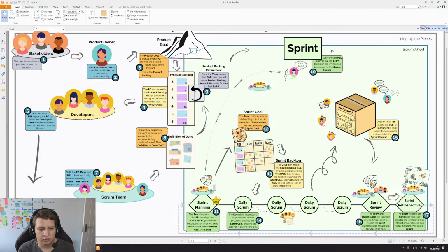The product owner wants less risk, so they would usually have a bias for shorter sprints, and the developers need enough time to get something significant done each sprint, so they tend to want a slightly longer sprint. It's finding the balance between the two: how much risk do we want to take on, and being able to get something significant done each sprint. I'd say it's the difference between a slice of bread and a loaf of bread, right? Our stakeholders would like a loaf of bread, not just a slice of bread. And the Scrum Master is, of course, involved in terms of facilitating that conversation and maybe even having some opinions of their own. Who knows?